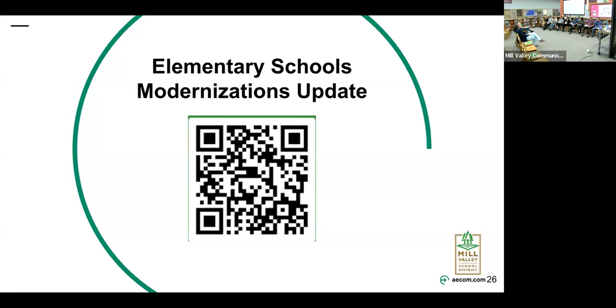And there we have a plan that will ultimately be finalized with the district, but our plan is to have no construction access during drop off and pickup to inhibit that. And also our access in and out of our construction site is not planned to be inhibiting the drop-off zone whatsoever. If the drop-off zone is to be used, it will be pre-scheduled, and it will be during times where kids aren't being dropped off or picked up.